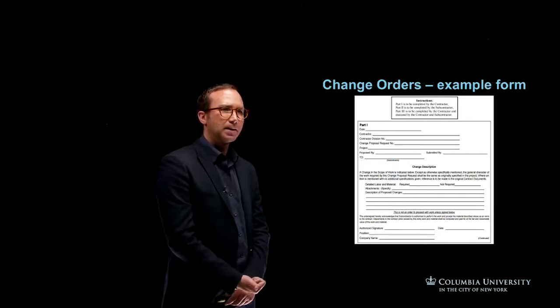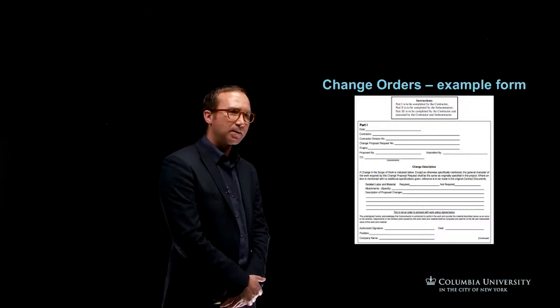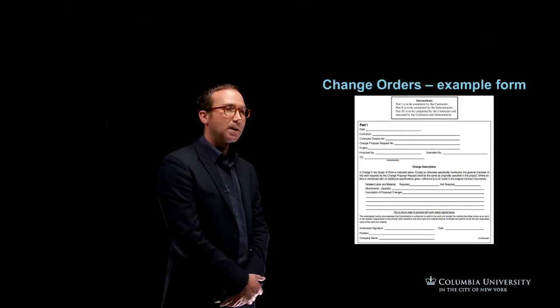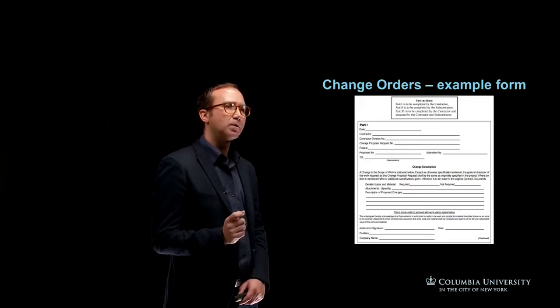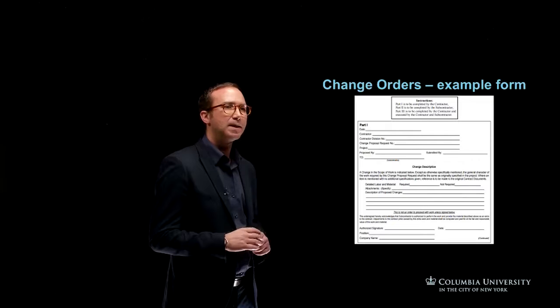You've got your date on it, really important. You've got the contractor. You might have many contractors on site. You've got your change request number, which is very important. So you need that to tally with your cost report. You want to make sure your change request number, or change order number, you're using matches the contractor, so we're all on the same page. It's easier to track then.